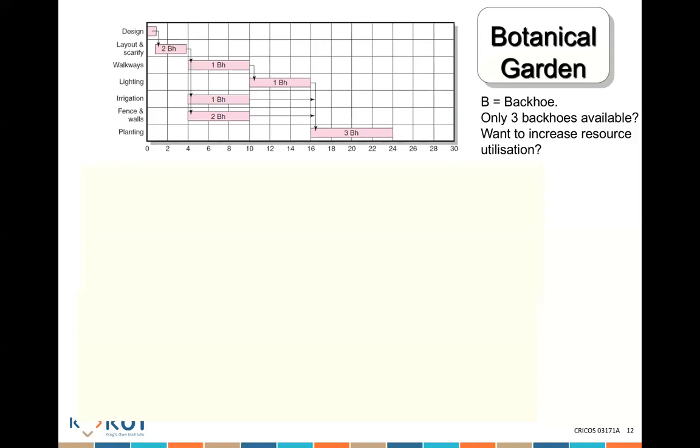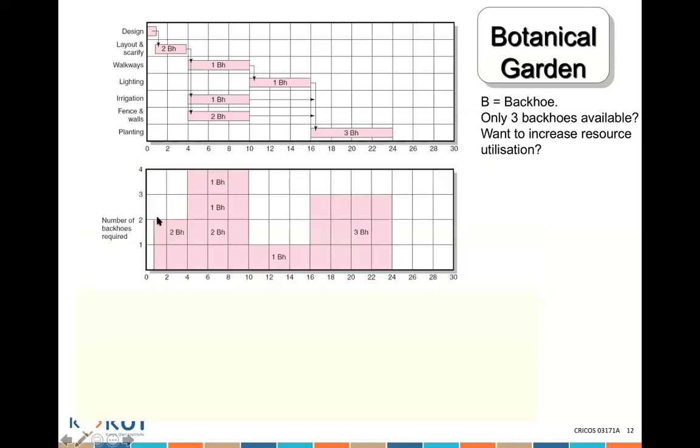It's poor. So if you look at it this way, you say, okay, I'm needing 2 people here, 4 people here, 1 person here, and 3 people here. But let's think about it. I have 2 people required here. Can you see this, 0 to 4? I can then say, well, I also have 2 people needed here. So why don't I do this one, 2 people, this one, 2 people, and then here I need 3 people anyway, so why don't I push this and this forward? Because, actually, sorry, we can't do that.